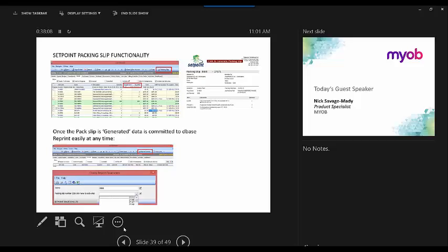We have service contracts, where we generate a service invoice and report. We used to have a Word document for a service report and then the invoice out of the system. With Focus's help, we merged that into one document, so we put it all into job costing, and when we generate the invoice for the customer, the service report is part of the invoice now. That is time and material straight billing effectively, or it's a fixed price contract, so that's just a straight progress claim. And for our large jobs, such as the job at the airport, we did 42 claims over 4 years, so we use progress claim billing as well.